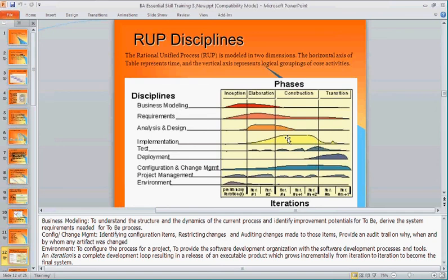If you find that the code is right, the requirements are wrong, then again, you still need to go into another iteration. In which case, irrespective of whether it is the code that needs to be changed, it is more of a configuration. If it is the requirements that need to be changed, again, you must go through the configuration and change management. You must document what changed between iteration 1 and iteration 2. You must go through all of these all over again.